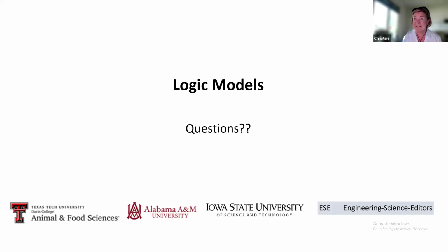The next thing that often goes wrong is people just list their tasks in the activity section rather than the deliverables. I don't want to know that you will develop seminars. I want to know how many. So that measurable term that has to go in there is often missing. And then on the end part, people don't go back into the RFA to pull the overarching goal of the funding agency into it. That's another one.